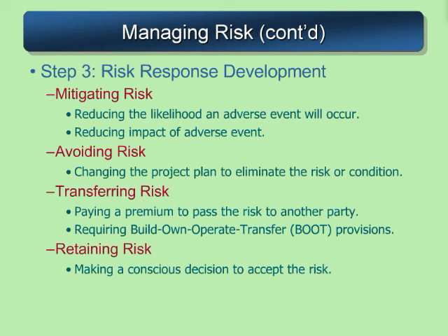And then maybe it's just the nature of the beast that even though there's a risk identified, we retain it. In the case of a demolition, one of the risks is clear: maybe the structure doesn't demolish correctly, and so we retain that risk with a plan to put in place if that risk event actually takes place.